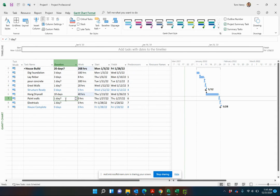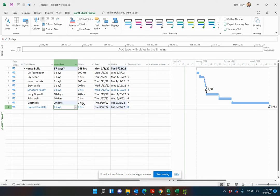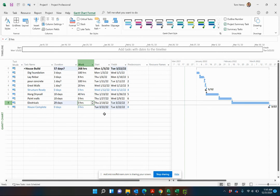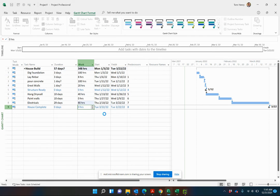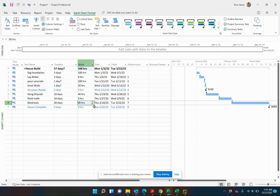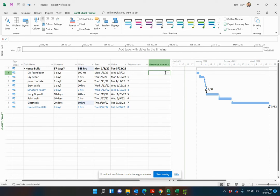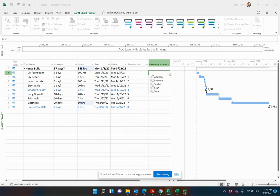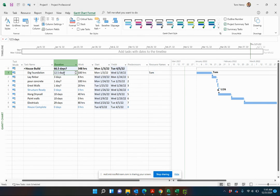So as you can see, we can quickly come in. I'm just going to add these in here. Electricals takes 29 days. Maybe they're just coming in off and on and waiting for other people to do their work in between. But it's only roughly 80 hours. So I'm working part time on that generally. So there we go. We've got the duration and the work of it estimated. When we start now adding resources to these tasks, you can see how it's now calculating and adjusting for me.